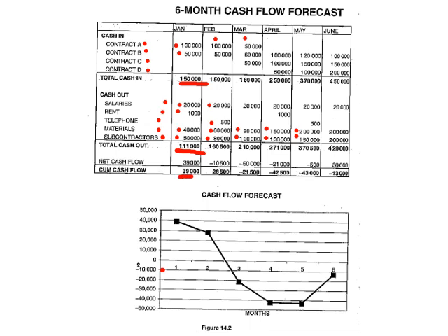So in this case, on month 1, the inflow was actually more than the outflow, so we start with a 40,000 surplus. Then in our second month, your inflow is 150,000 and your outflow is now 160,000. The difference is 10,000, so it goes down by that 10,000.